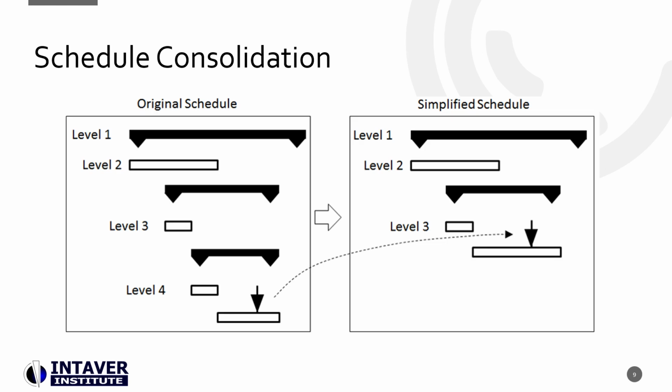Schedule consolidation is used to simplify the project schedule. A consolidated project schedule is equivalent to or has conformity with the original project schedule based on the main project parameters: finish times, milestones, duration, costs, and resources, etc. Schedule consolidation significantly reduces the number of tasks by removing sequential activities and replacing them with large consolidated activities. Risks and uncertainties are applied to consolidated activities, which simplifies interpreting the results of analysis.